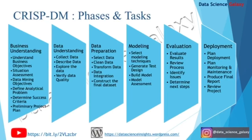Evaluating data science projects includes both quantitative and qualitative assessments. Evaluation is a critical stage because several stakeholders involved in the project must provide a formal sign-off before the model gets deployed into the production environment as part of the deployment phase.